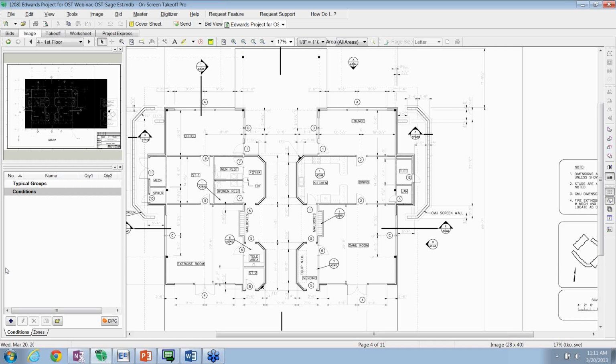So once we get the drawings established, we're into the images, we rename some of the sheets that we want to work with. As we do that, we can also come down and set the scale. If we set the scale, we can come right here on this drop down and simply choose the scale. Above and beyond that, if you're dealing with CAD drawings, what I've seen is that information stays true to the drawings, and there really isn't any difference in terms of resolution and your scale being off.